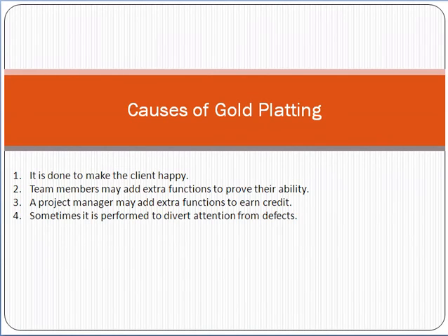Friend, what are the causes of gold plating here? The most common is that it is done to make the client happy. The client will be happy, he will send some emails about you, he will appraise you, he will give good feedback about you, just to gain the happiness of the customer. Team members may add extra functions to prove their ability. They prove that they are very capable, so they add this functionality. A project manager may add extra functionality to earn credit from the customer side, so that the customer will be happy. The customer says that he is a very good project manager.